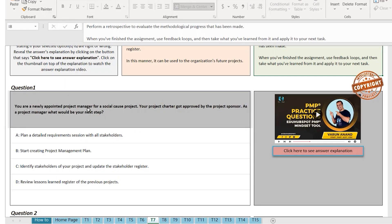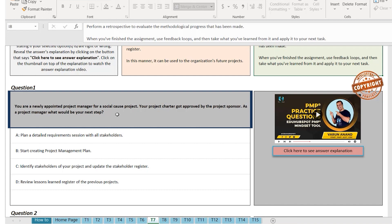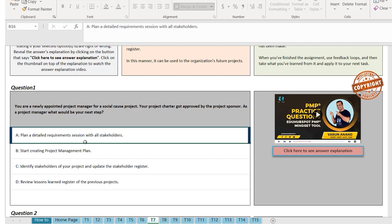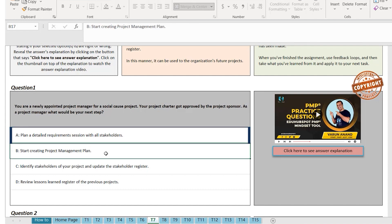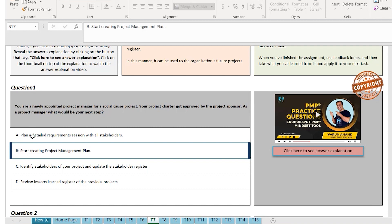So let's do one question. You are a newly appointed project manager for a social cause project. Your project charter got approved by the project sponsor. As a project manager, what would be your next step? Option A: plan a detailed requirement session with all the stakeholders. You can do that — once the project charter is approved, you can start creating the project management plan. But technically, B — start creating the project management plan — is a better choice than A. So A should be wrong.